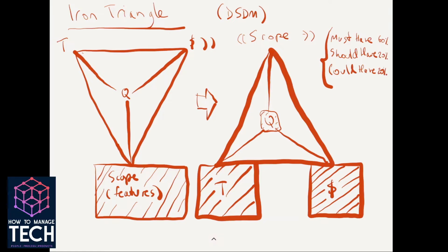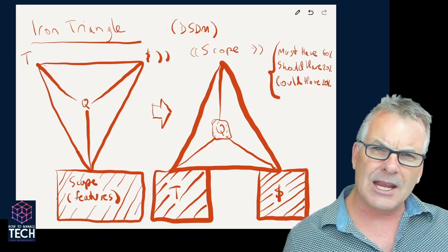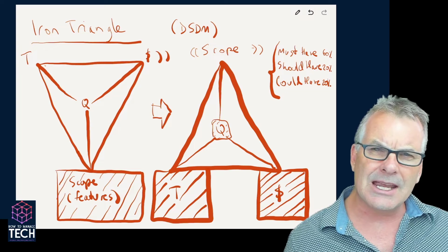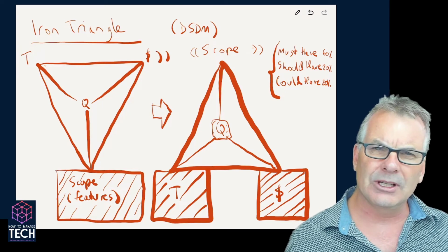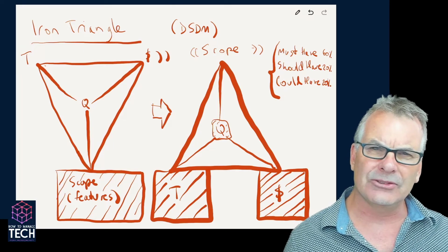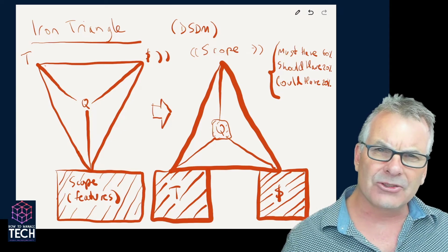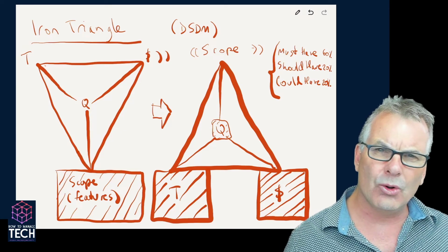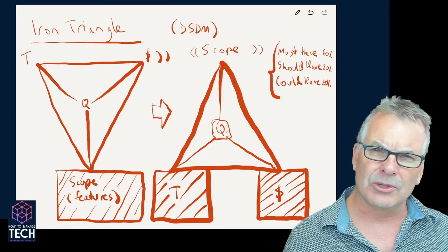And then what this means is that we are fully expecting to deliver all of the must-haves and most of the should-haves in a normal project. So on time, on budget, on quality, we will deliver you something that works, right? And we're expecting that to be 80%, all your musts and all your shoulds. Worst case scenario, we'll ditch the coulds, ditch the shoulds, and still have our core workable set of must-have, and they represent the minimum usable subset.